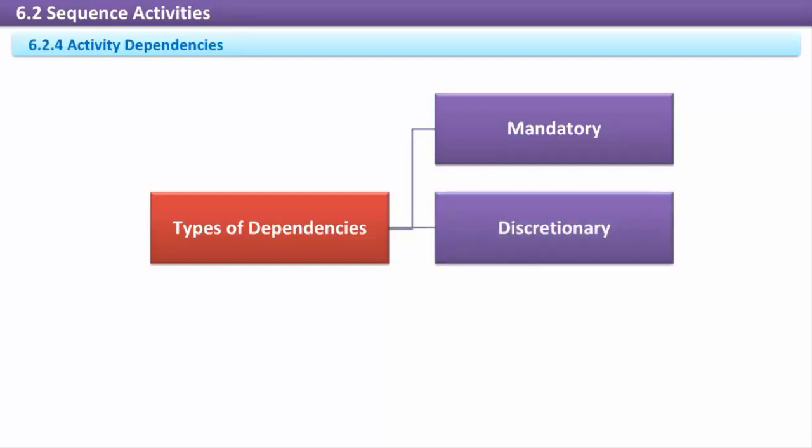Discretionary. A logical or preferred order to the activities. For example, in a remodeling project the team would prefer that carpeting not be installed until all painting has been completed. Discretionary dependencies can be reordered if necessary, but doing so may result in additional risk factors.